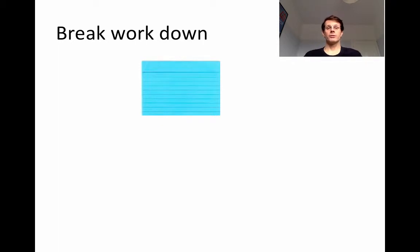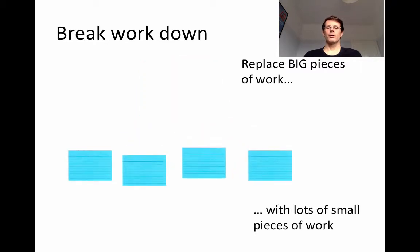To start off with, get good at breaking work down. Recognize we need to break work down and replace big pieces of work with lots of small pieces. Small pieces of work flow through the system more easily, allow us to track progress, de-risk us, and increase value.